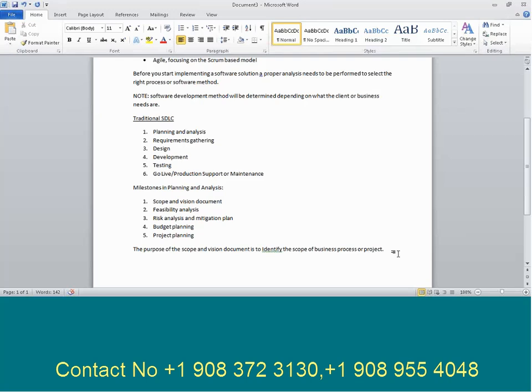I said, okay, fine, we are going to allow the users to transfer funds. But however, if you are implementing a solution to give the clients the capability to transfer funds only within the same bank, you need to mention very clearly that the scope of this project is funds transfer within the bank, and any external transfers are out of scope.